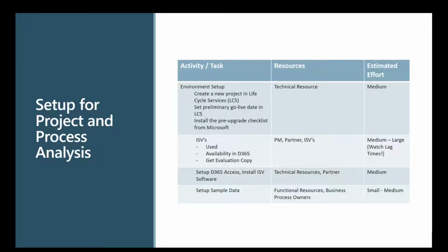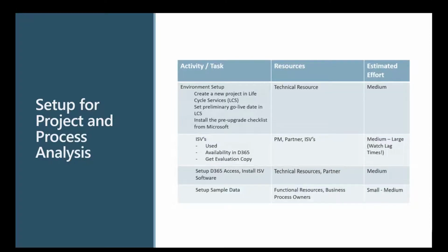We want to make sure that we're involving those ISVs immediately up front, because if we start making decisions during this process and we don't have the ISV that you're using right now on D365, that could change or cause more rework or more iterations that we have to go through. But this is just something to note in terms of typically what that work effort is going to be.